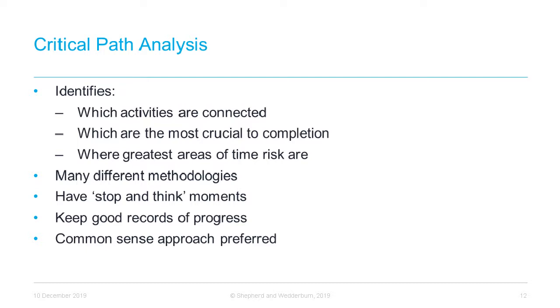However, overall, it is important not to lose sight of the purpose to which this analysis is being carried out. In our experience, there is little benefit in undertaking complex delay analysis if this is not presented in a manner that is understandable to the decision maker. The courts have generally expressed a preference for a common sense approach and have made clear that theoretical delay analysis techniques will not be a substitute for causation in fact and in law.